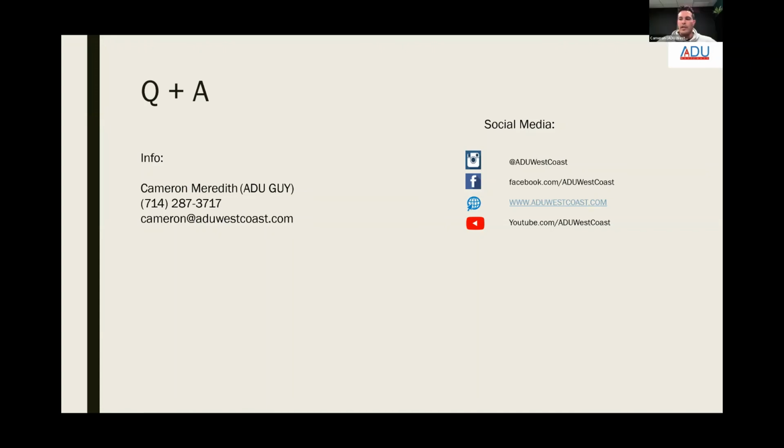Yes, it's a great question. They have their own submittal process, depending on your HOA. So I always tell the client to ask, before signing anything, what's your process? But what we do, since we already packaged that for the city, it's the same exact thing. So we package it for the HOA, and then you just hand it off to the HOA. They'll review it, and anything they need from us, we'll provide. Usually they want to know what type of windows you're using, and whether the exterior is going to match, which it has to anyway. So a lot of it is what type of material you're using and what the floor plan looks like. But yes, we will handle all that for you.